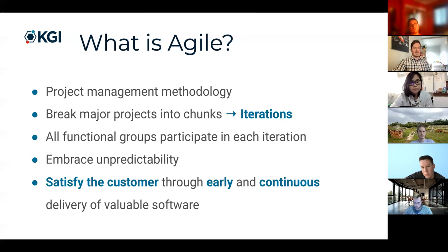The idea with Agile is that that's a poor way of doing it. Instead, what you should do is have a smaller project, but you've got the product managers, the engineers, maybe even the marketing team, all involved in one team so that they can talk to each other about what does the customer want? That comes from marketing. What can we do? That comes from the engineers. How does that all fit together? That comes from the product managers. And so having them all on one team enables them to always know where each other stands and to see where the constraints might be on what they're able to do. So that's another core aspect of Agile.